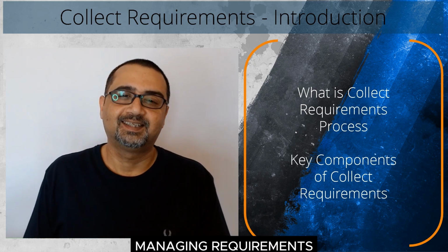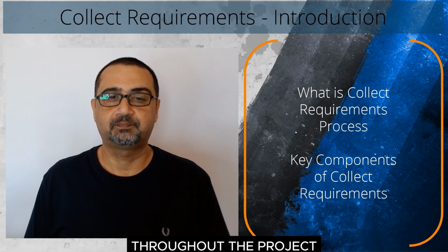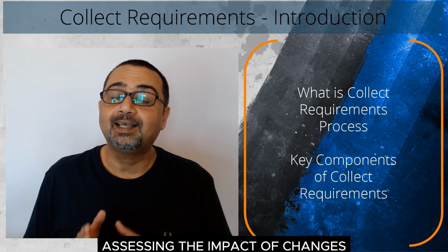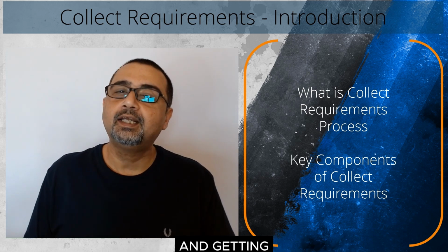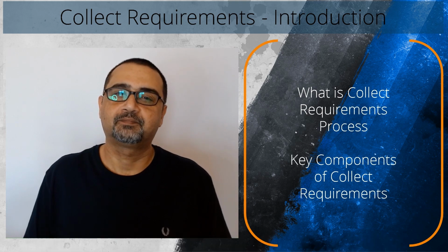Managing requirements. This involves managing changes to the requirements throughout the project. This includes documenting changes, assessing the impact of changes, and getting approval for changes before they are implemented.